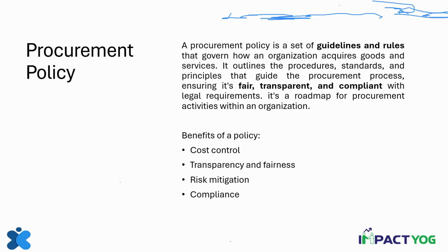In the budget justification note, we have to explain, if we are buying software, this is the kind of software that we are buying. If we are buying fixed assets, this is the model, this is the kind of fixed asset that we are buying, so that you are able to get the best estimation of cost in your budget, and there will be minimum variation between the budget estimates and the actual cost. You will have a budget variance report which will show minimum variance, and therefore you might not have to take too much action in handling the variance. Understood? So that's how I'm saying.